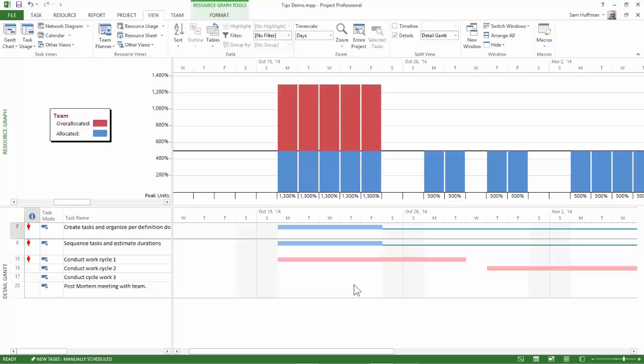What are the possible solutions? That's the fifth question. Well, in looking at this, a couple of things come to mind. One is, if you're only over allocated a small amount of time, you may want to do nothing. I wouldn't spend 5 to 10 hours trying to solve a 1-hour problem in a schedule. That's just not a good use of your time. Think reduce, not necessarily eliminate over allocation. If you can get close, then that's not bad. That's pretty good. That's the best you can do.